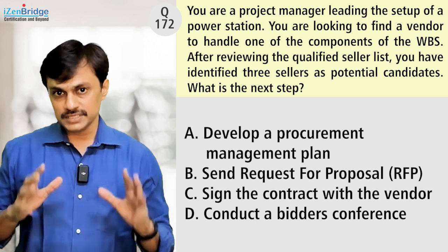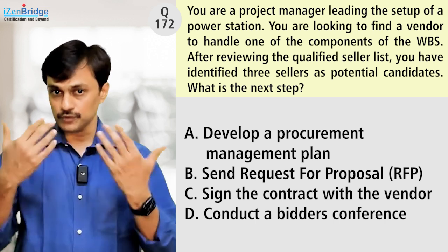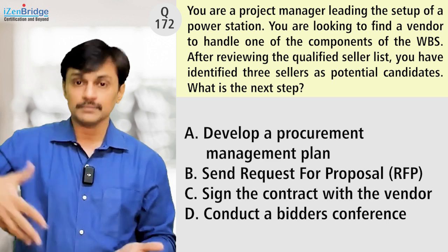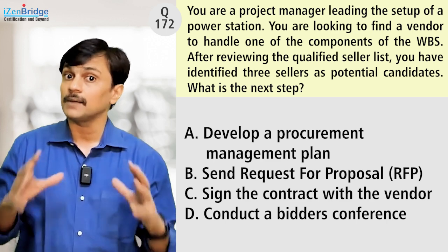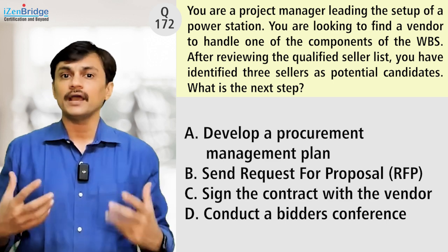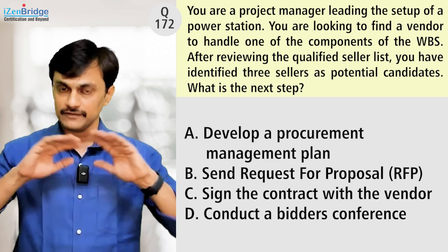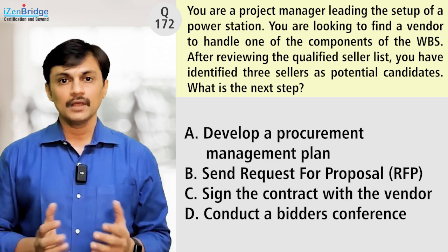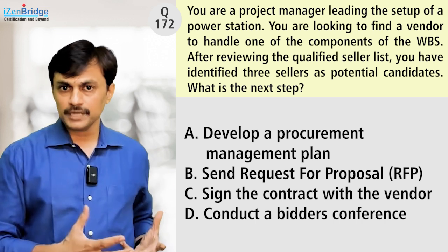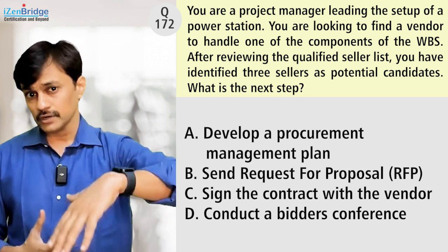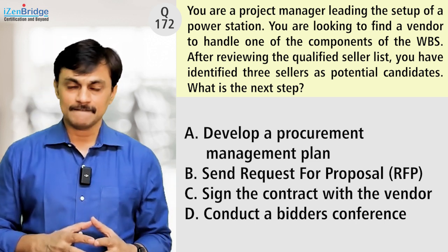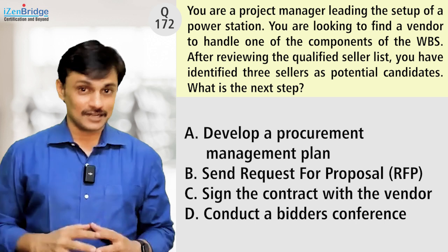Most of the cases you will see that I will ask for a request for proposal, so my vendors can understand my requirements, and they may come up with a set of questions. And then I will bring them together and say, okay, ask your questions, and I want to create a clarification on a common platform. Directly after having an understanding of the procurement statement of work, going to a bidders conference is possible, but very unlikely. And that is where these 2 options are coming close.